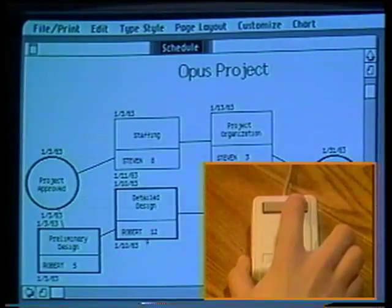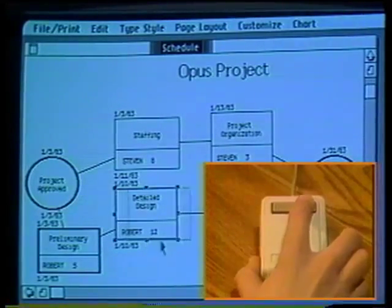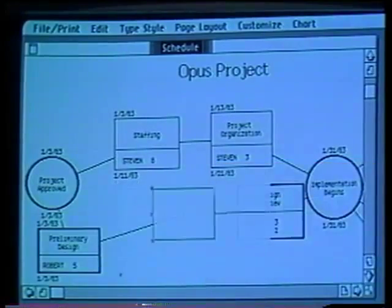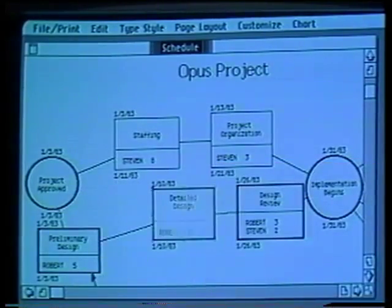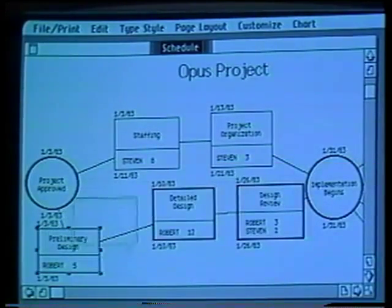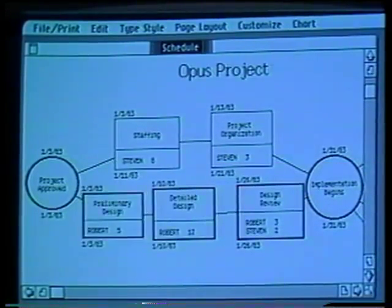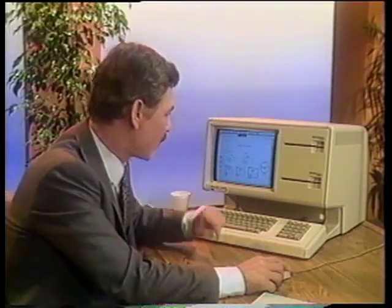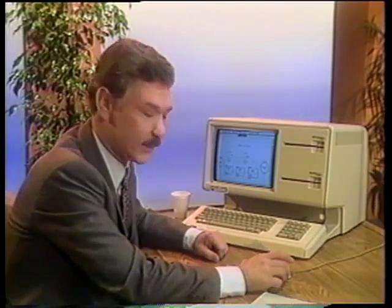I can rearrange the boxes to make the chart easier to read. All I do is grab the box with the mouse and move it over. I assigned Robert to the new task and gave him five days to complete it.